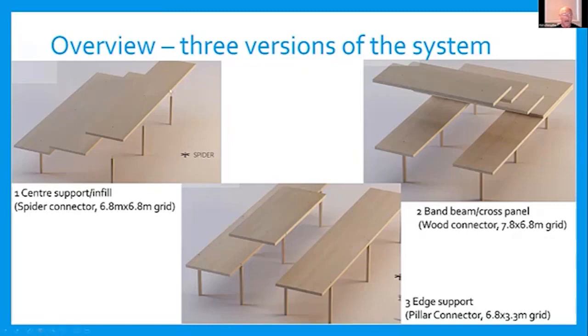So that became a temporary construction or on-site problem. Then we have to get this first one in place, second one in place, and then drop the 3rd centre infill panel. In fact, we found it better to put all of these tables in place and then do the infill panels as a latter process.